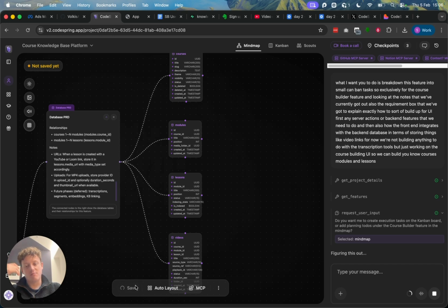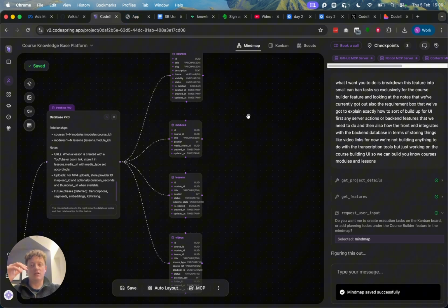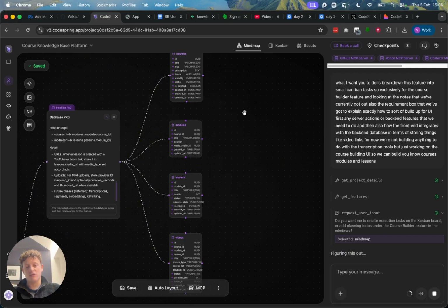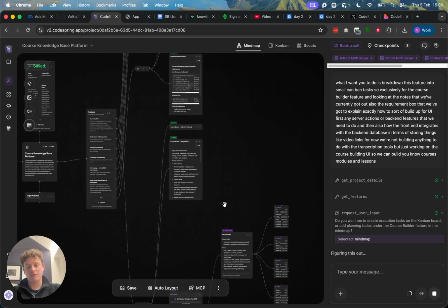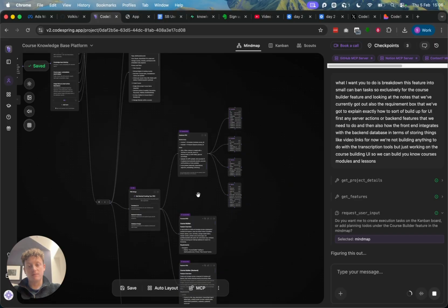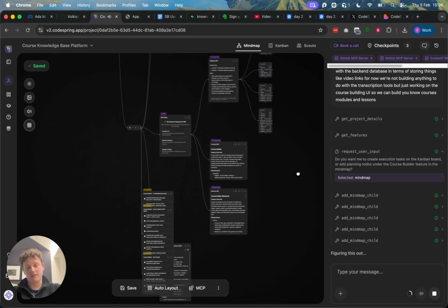And that's the thing to remember with this, right, is we're designing an app, but don't design the final thing. You have to build it bit by bit, build it up. So don't design 1,000 different features. What we've got here is 9 different features, and we're going to build these 9 different features first. And then once we've got them built, then we can start on more complicated features.